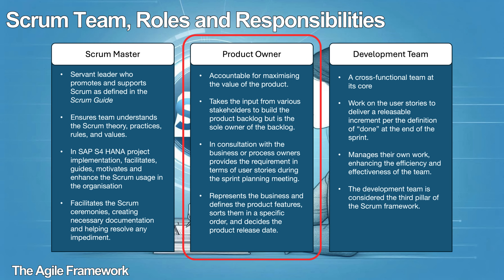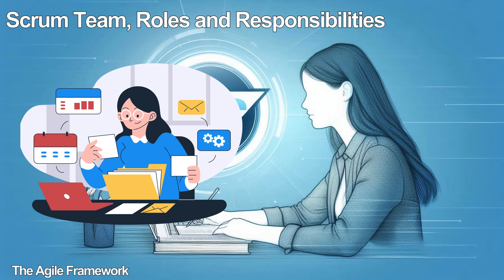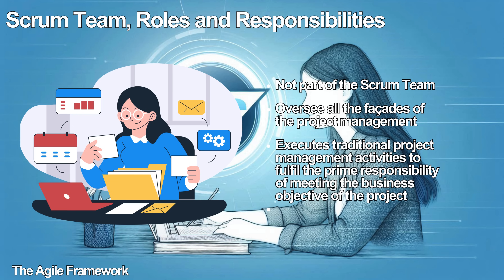By definition, a product owner represents the business and defines the product features, sorts them in a specific order, and decides the product release date. The development team is a cross-functional team that consists of professionals who work on the user stories to deliver a releasable increment per the definition of done at the end of the sprint. The development team is a self-organizing team who manages their own work, enhancing the efficiency and effectiveness of the team. The development team is considered the third pillar of the Scrum framework. The project manager is not part of the Scrum team. In an SAP S/4HANA implementation project, the project manager will oversee all the facets of project management and fulfil the prime responsibility of meeting the business objective of the project within the defined constraints.